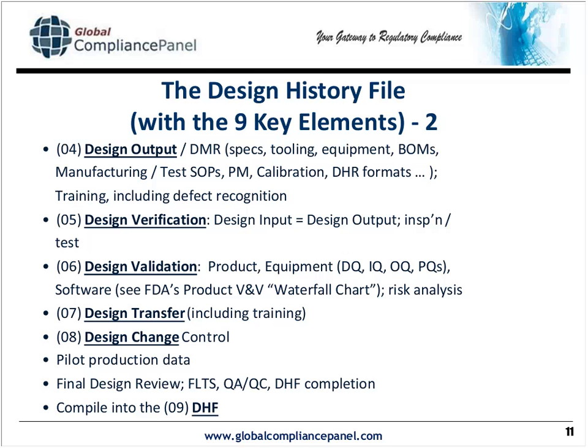Now that generally basically means that, because R&D, you can imagine they're tending to throw up over this entire concept. It basically means that whenever you make a change to the design that you've generally accepted as being the product's design, and now you start having problems with some areas, maybe the type of material, type of bonding agent, etc., that you recognize you have to make some changes, those changes are signed off by more than one person. They're approved, if you will, and that's documented. So you have a change history throughout.